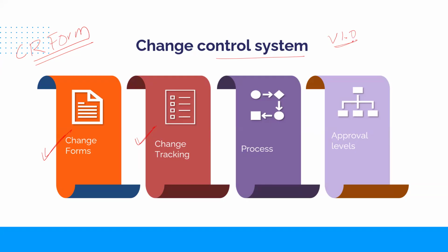What was the change? When was it made? So we'll come up with another version, version 2.2, keeping the previous version intact. All right. So for a reference, we need some kind of a version tool for version control, some kind of a process for that. So that is tracking. We need a process now, a step-by-step process for change.